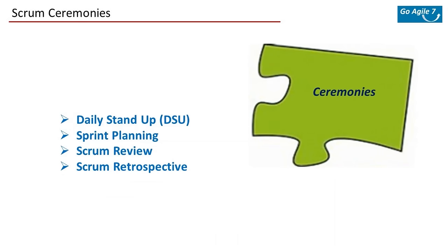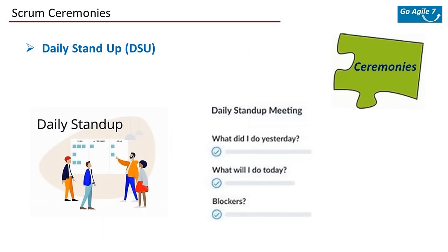Next, let's look at Scrum ceremonies — basically a set of meetings. There are four such ceremonies collectively called Scrum ceremonies. The first is the Daily Stand-up (DSU). Every day when you start, you begin with a short 15-minute meeting. Each member shares what they have done so far (yesterday), what they plan to do today, and whether they're stuck with any bottlenecks or impediments.